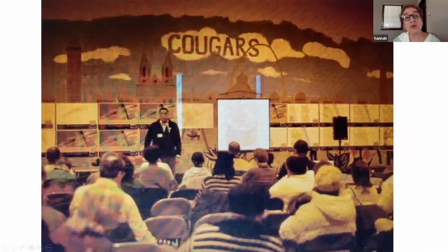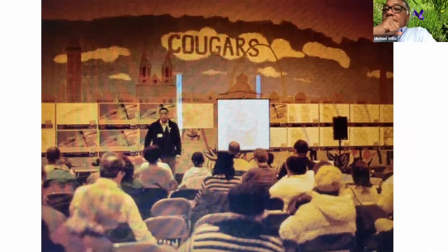I'm sorry, Michael, can you hear me? I'm sorry, Hannah. On your planning, on the schedule for the project, you really need to build in lots of time for this planning phase, even if it's a small project with a small budget. Hannah? Yes, Michael. I'm sorry, I didn't hear your last comment. We got cut off. I was just saying, even if you have a small project with a small budget, you still need to build in significant time for these early meetings with the community. You really need to add that to your project schedule.